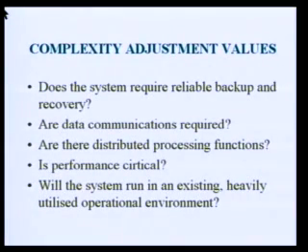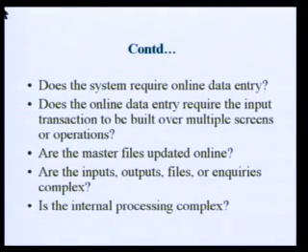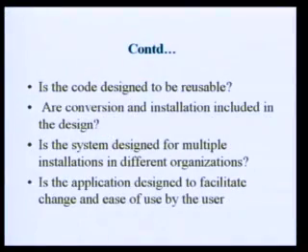Please go through the slide. All the 12 points are visible there. Does the system require reliable backup and recovery? Data communications required? Distributed processing functions? Performance critical? Will the system run in an existing heavily utilized operational environment? Does the system require online data entry? Does it require input transaction to be built over multiple screens or operations? Is there any need for master files to be updated online? Are the inputs, outputs, files or inquiries complex? Is the internal processing complex? Is the code designed to be reusable? Are conversion and installation included in the design? Is the system designed for multiple installations in different organizations?